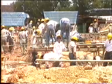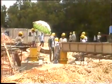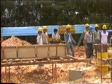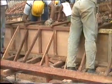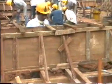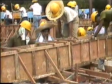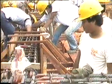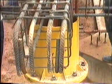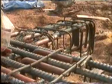The next stage of our operation is the construction of tie beams. These tie beams are built at the base of a shell roof. We first set out the alignment accurately in relation to the steel pile caps, which have just been installed. We then follow this alignment to position a tie beam formwork. The steel reinforcements are then carefully set out inside the formwork, especially at the corners where two tie beams meet, as this is an area of heavy congestion of bars.